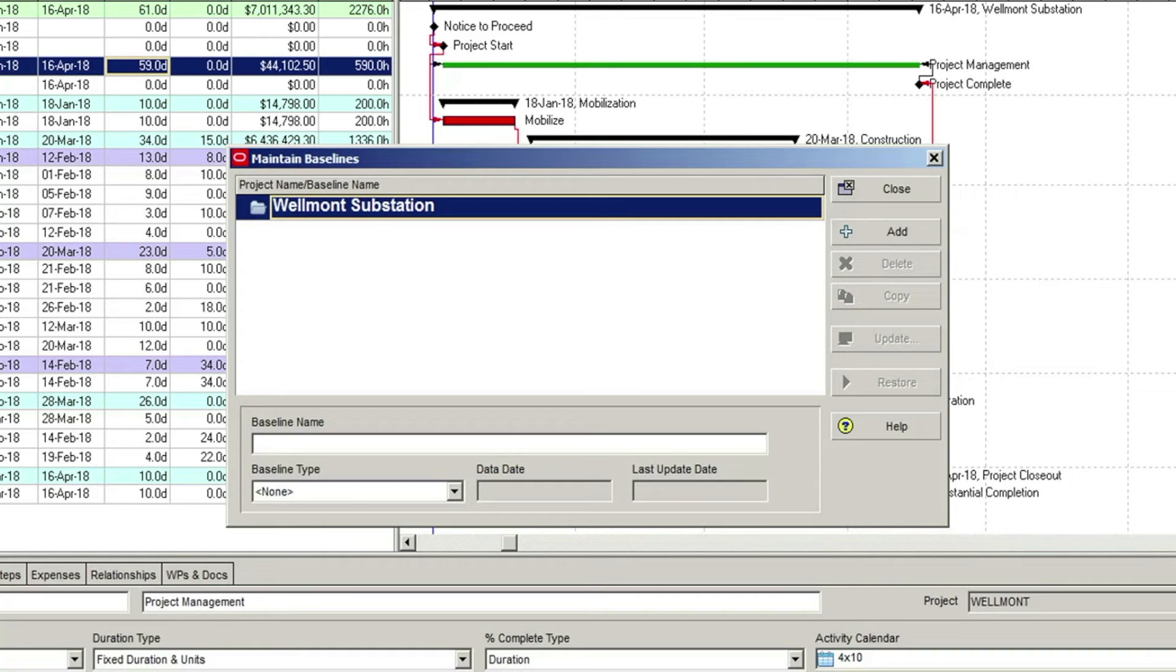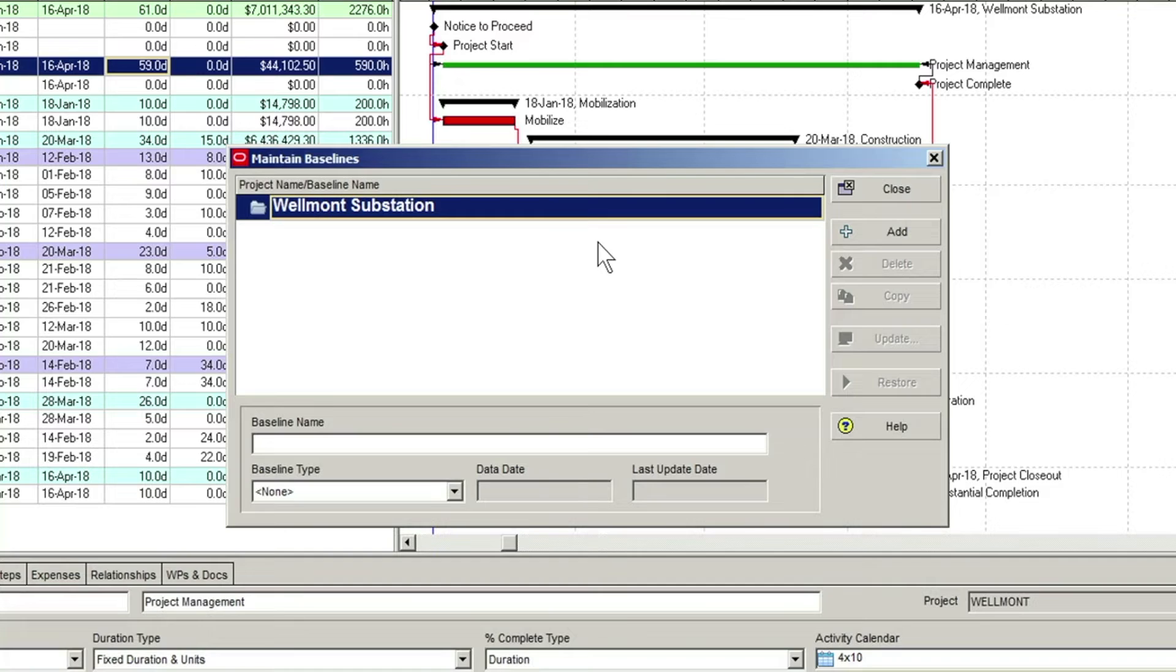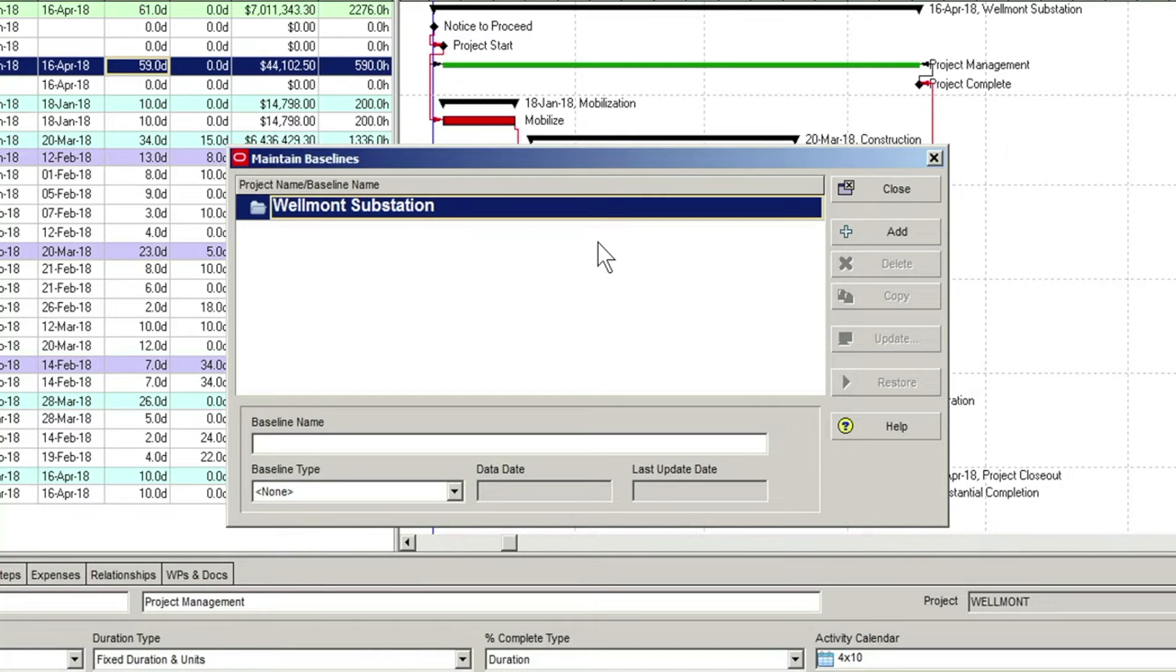In here, you will see a list of any open projects. In this case, we have just the one Wellmont substation project open, and thus is already highlighted. To create the baseline, the Add button is clicked.